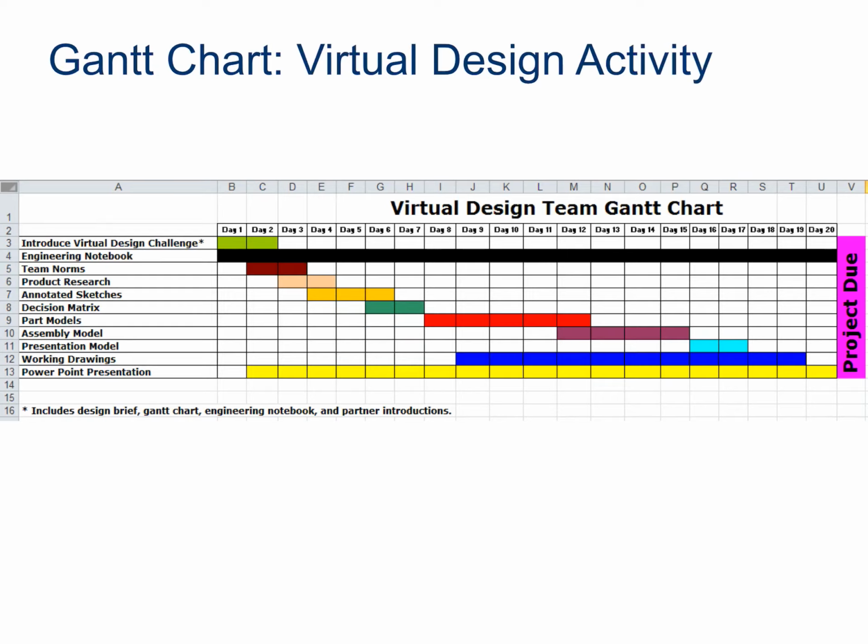So this is what a Gantt chart looks like. I used Gantt charts all the time when I worked in construction management in college. As a construction manager on a project, I was in charge of putting together, my team, I was an intern, but my team was in charge of putting together a Gantt chart. And then we could tell the subcontractors, the electrician, the plumbers, when the carpet was going to get put in, we could tell them when they would be working. And it's really important that it's correct, because my electrical contractor is then going to plan their workload based on